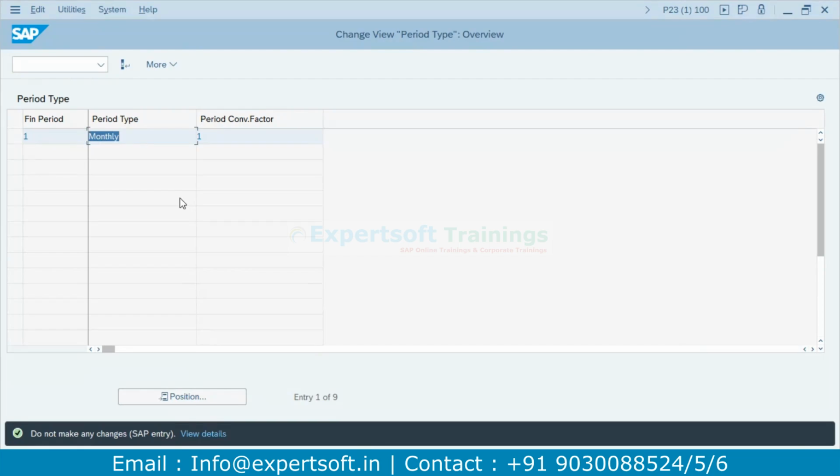Whether it is projects, items, initiatives, or your bucket levels, everything will be considered by the system only at the monthly level. In that case, you cannot convert that monthly into quarterly or yearly, or every 2 months, or 4 years, 5 years span. That's the reason you can consider monthly, quarterly, half yearly, and yearly. At least these four configurations should be there.